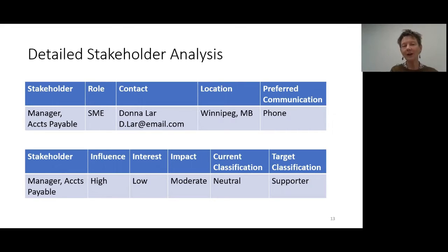I have a stakeholder, and I would number these. I seriously would number these because I want to know how many stakeholders I am dealing with. So this is partly estimating. I want to know the stakeholder, their role on my change, how I'm looking at it, and their contact information. So there's a certain amount where stakeholder identification crosses over into the stakeholder register. And then I get into, okay, so what about them?